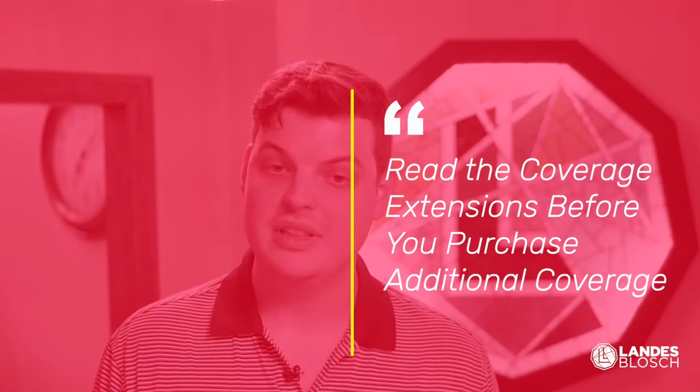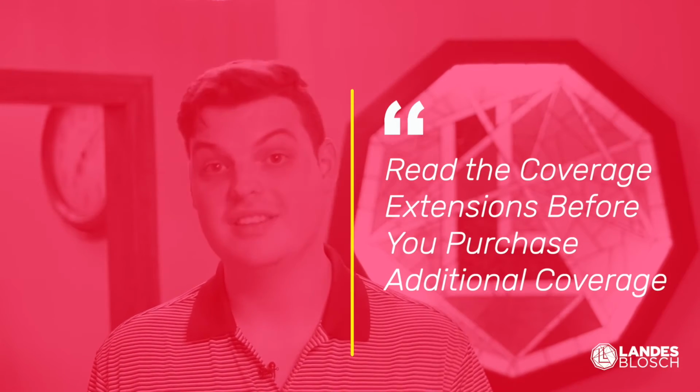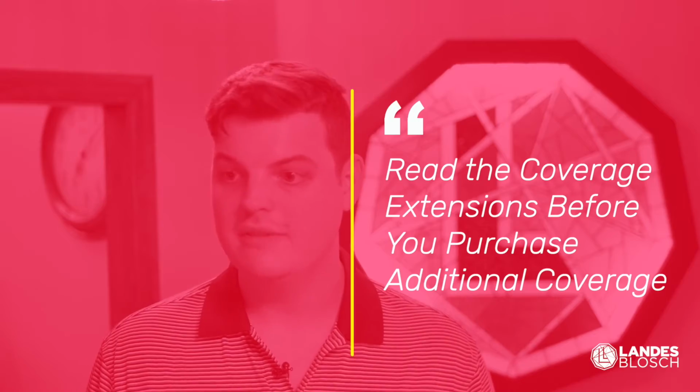Our second is to read the coverage extensions before you purchase additional coverage. Chances are, if you need additional coverages, you might have it somewhere on the coverage extension page. An example of this might be you have extensive landscaping costs. Instead of first adding those landscaping costs into your limit of insurance under the landscaping portion, check the coverage extensions to make sure that you don't already have a limit, and if you do have a limit, make sure it's adequate and that you don't need to add more onto it. This should save you money in the long run.